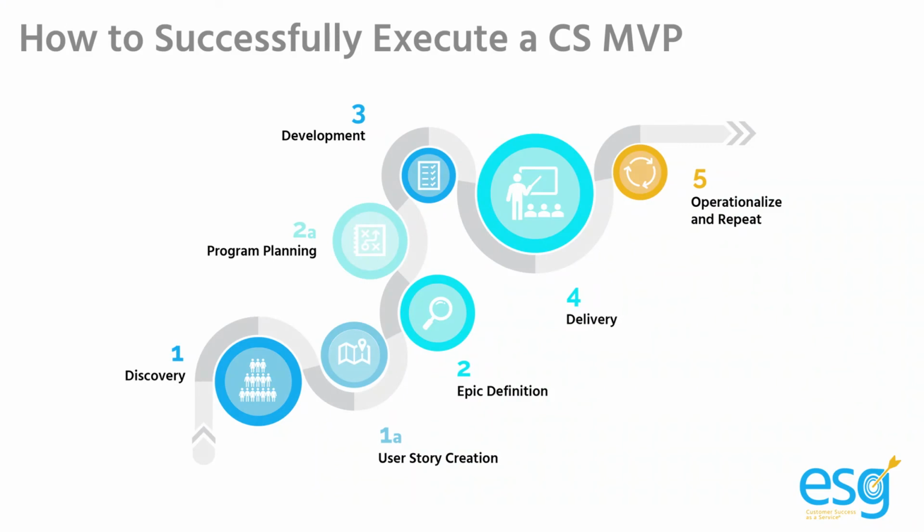In the deliver phase, you'll want to focus on a couple of things. Number one, finalizing all documentation associated with all of the deliverables. Number two, creating a final MVP presentation deck which showcases the work completed. And number three, presenting the final MVP deck to applicable leadership stakeholders, securing approval to move forward with operationalizing the journey and experience you and your MVP team have created.